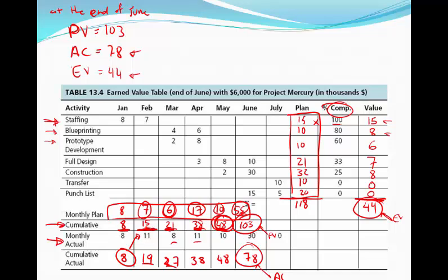But more importantly, the power of using earned value is there's the concept of using your estimated time to complete the project, and that's a forecasting tool. And estimated cost to completing a project, again, is another forecasting tool. And that's important for you to determine whether you're going to be able to meet your project deadlines or not.